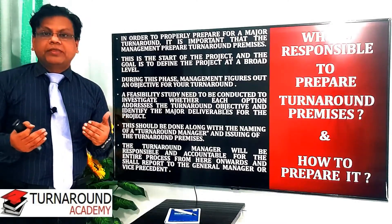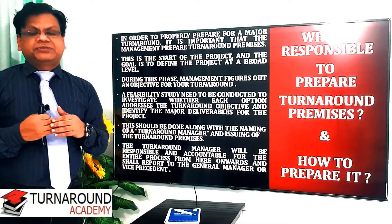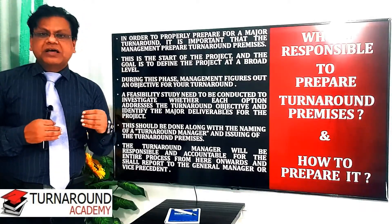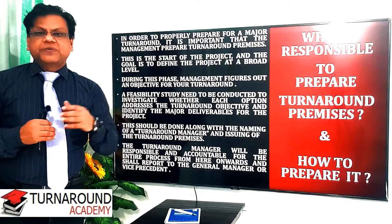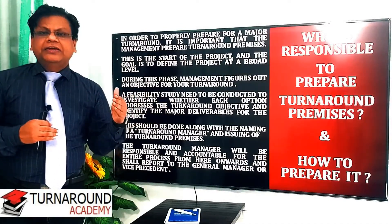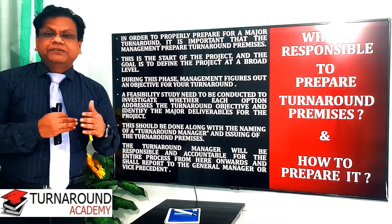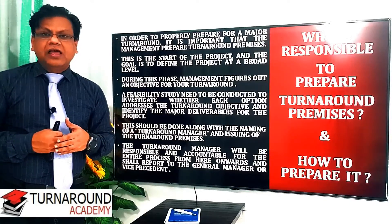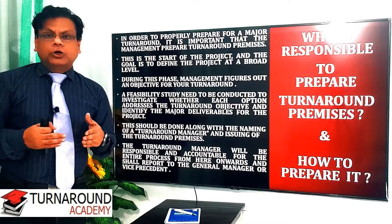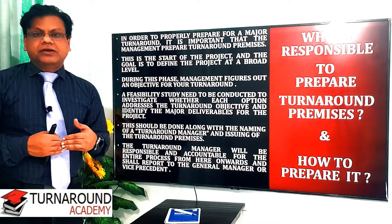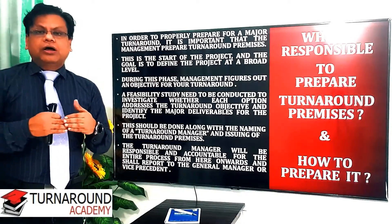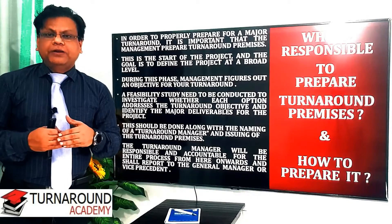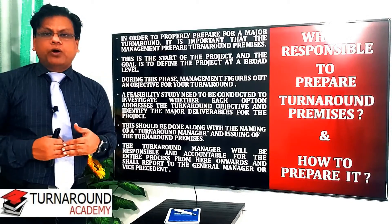A feasibility study needs to be conducted to investigate whether each option addresses the turnaround objectives and to identify the major deliverables. This is one of the important activities management needs to carry out. For example, suppose you have an underground cooling water line to be replaced — the scope given by the inspection team because of leakage throughout the year. You need to assess: is it feasible during the turnaround? Can you do the excavation where other activities are ongoing, where crane movement will be restricted, and where there may be water logging? Feasibility study helps identify the best option to attend that particular scope of work.